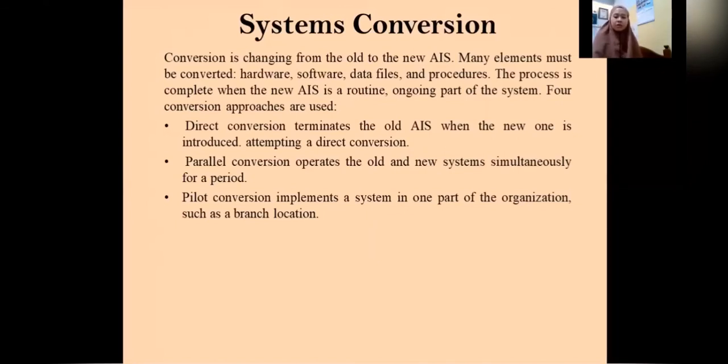Parallel conversion operates the old and new systems simultaneously for a period. 3. Pilot conversion implements a system in one part of the organization, such as a branch location.